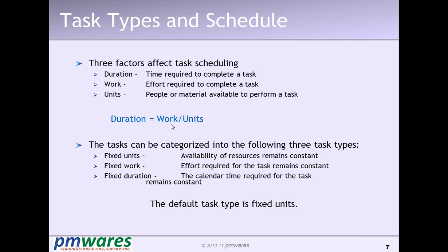In this, what we do, we enter one from our hand, one we put as fixed, and the third thing we leave for MS Project to calculate. You're getting my point? One we keep frozen, another thing we enter, like in this case we have entered work, and the third thing we leave for MS Project to calculate.